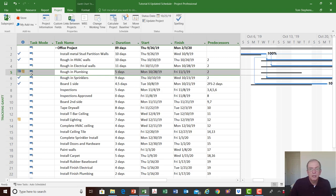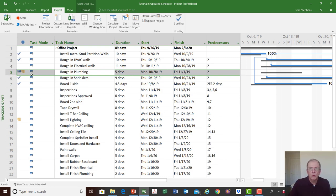That's very important to document. If we didn't cause the delay, there might be claims against us, or we might want a change order approved. Documenting is easy to do when it's fresh in your mind. Six months from now it's going to be very difficult — you'll be going back to journal entries trying to extrapolate what happened.